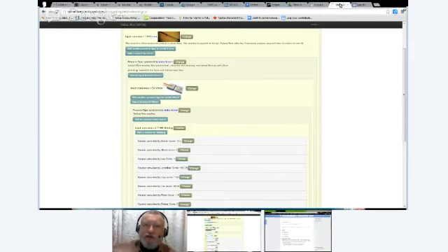Now, this is a process. This is that whole dependent demand algorithm that I sent you a link to a description of. It basically takes and explodes the recipe and figures out all the requirements, and back schedules from the due date. When does this have to be done? Then it looks at materials: do I have any of this stuff in inventory? Maybe I already have some mirrors around. We don't have to make those.